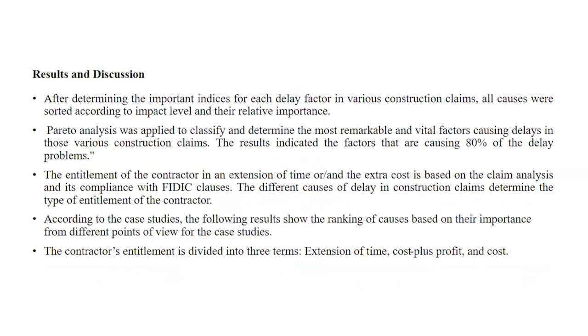Flowchart. Results and discussions. After determining the important indicators for each delay factor in various construction claims, the causes were sorted according to impact level and their relative importance. The Pareto analysis was applied to classify and determine the most remarkable and fatal factors. In the end, the entitlement of the contractor to an extension of time and or extra costs is based on the claim analysis and its compliance with FIDIC clauses.